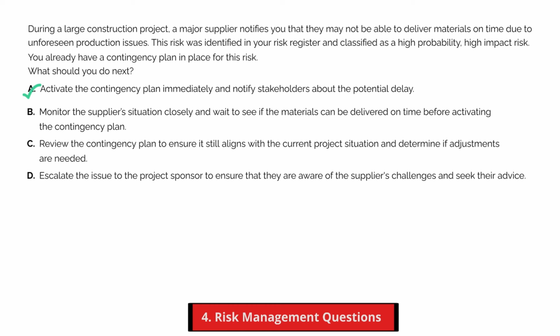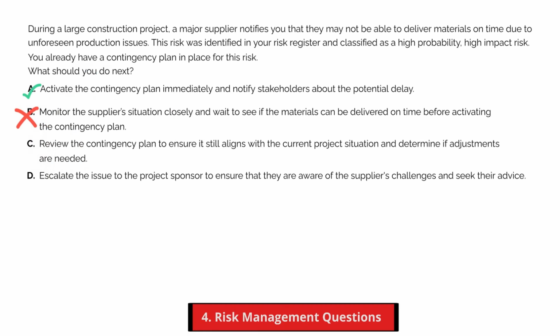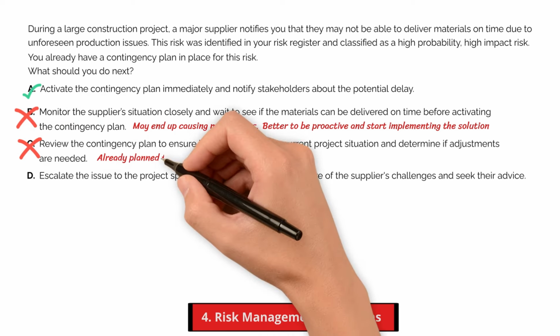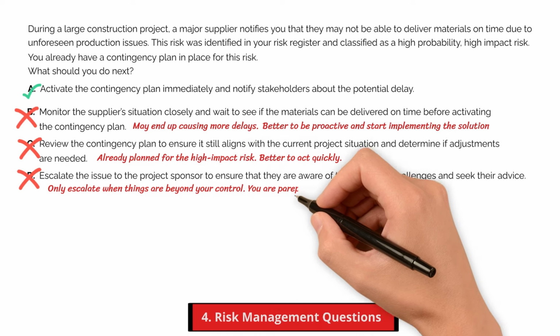Let's look at other choices and why they are not the best answer. Choice B is incorrect. Monitoring the situation might feel like a cautious approach, but if you wait too long, you could end up causing more delays. It's better to be proactive and start implementing the solution. Choice C is incorrect. Reviewing the contingency plan isn't a bad idea, but since you already developed the plan specifically for this high-impact risk, it's better to act quickly. You can always fine-tune the plan if necessary, but don't let that slow down your response. Choice D is incorrect. Escalating to the project sponsor should be reserved for situations where you don't have a plan in place or when things are beyond your control.